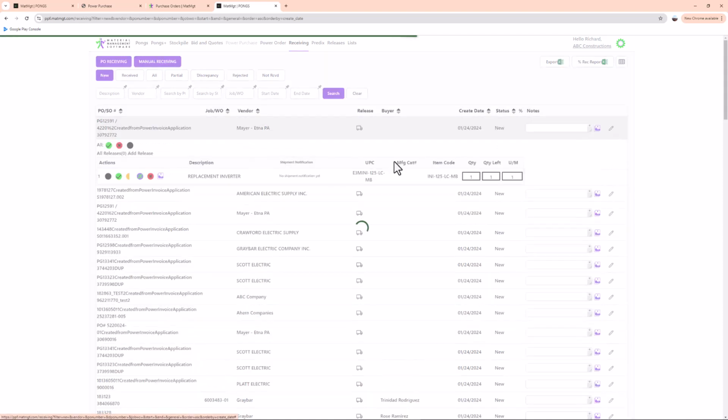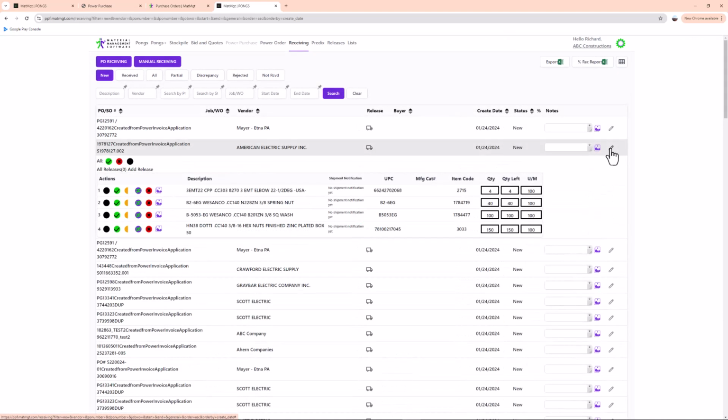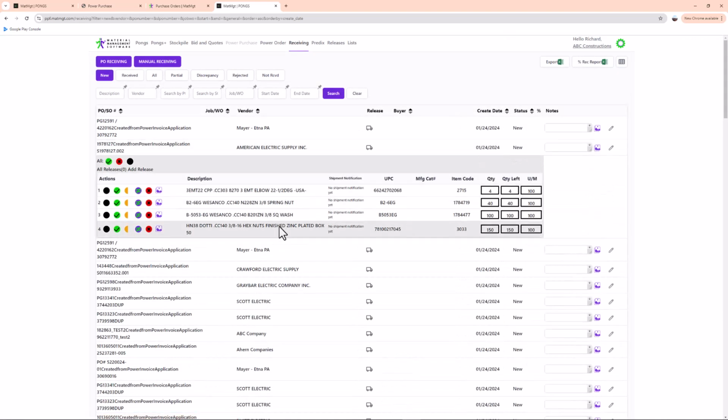Because with the purchase order acknowledgement, we have the actual items and the information that your distributor knows about that item. So if you ask for a 4-square, you don't know if you should be expecting a Rayco 232 or a TP 403. This information from the distributor comes before the shipment happens.